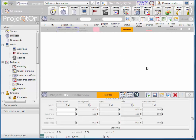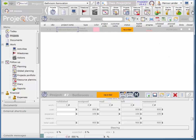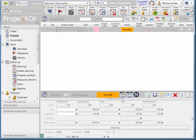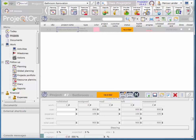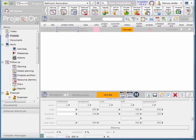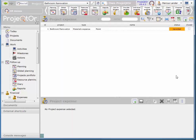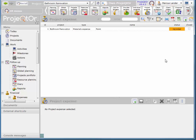So in order to add expense, I'm just going to add an expense for, for example, flooring. I'll say the flooring for the bathroom is going to cost about $300 or something like that. So in order to add that, you scroll down and choose project expense. This is where you add all of your material costs.